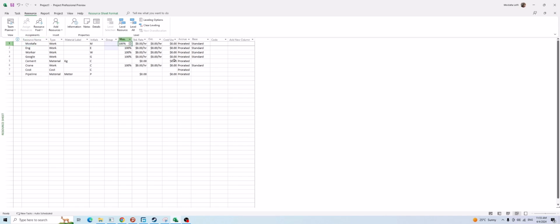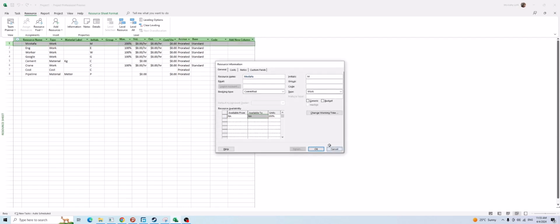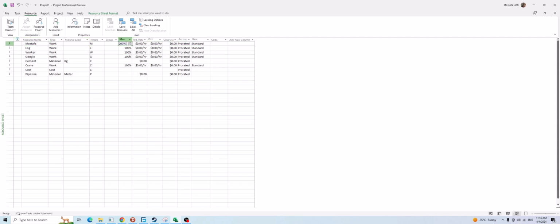If I put 200%, it means Mustafa's availability for your project daily is 200%. It means if each working day is 8 hours, Mustafa is available to work for 16 hours. If it's 10 hours per day, then Mustafa's availability for your project is 20 hours daily.